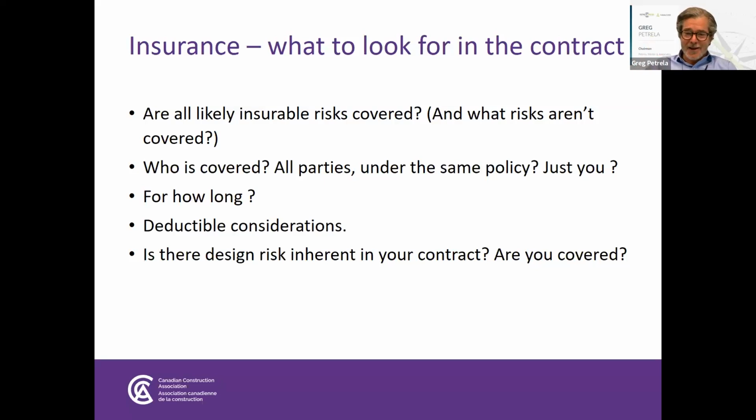But that doesn't make them not responsible for it under contract. They're fully liable and responsible for the design under a design build contract. And thankfully, the design build contracts require a certain other insurance, which is not typical in other construction contracts, which is professional liability, which is designed specifically to attend to, and it does a pretty good job, but not entirely thorough job at insulating and insuring against design-related risks that the design builder is assuming by way of their contractual assumption under the contract.